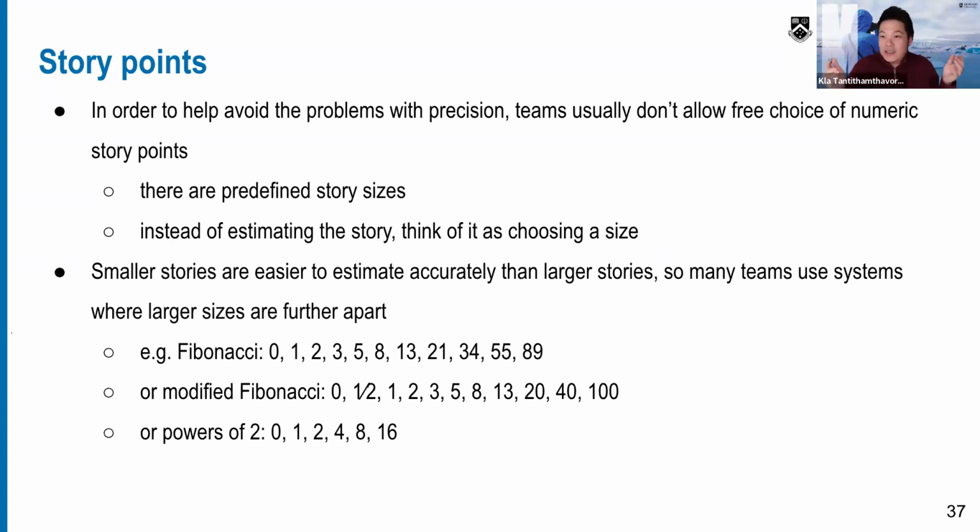But if some tasks take 13, the rest can be only 7 of one story point instead. Does it make sense? So assigning the story point helps the project manager limit the tasks that you're going to prioritize and move to in progress for that sprint. Okay, make sense?